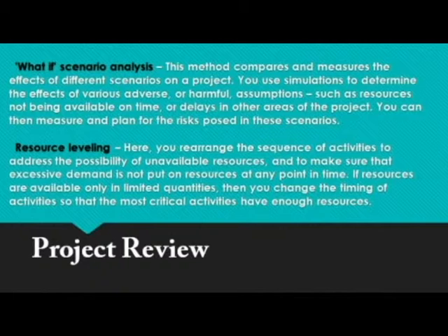You use simulations to determine the effects of various adverse or harmful assumptions, such as resources not being available on time or delays in other areas of your project. You can then measure and plan for the risk posed in these scenarios.